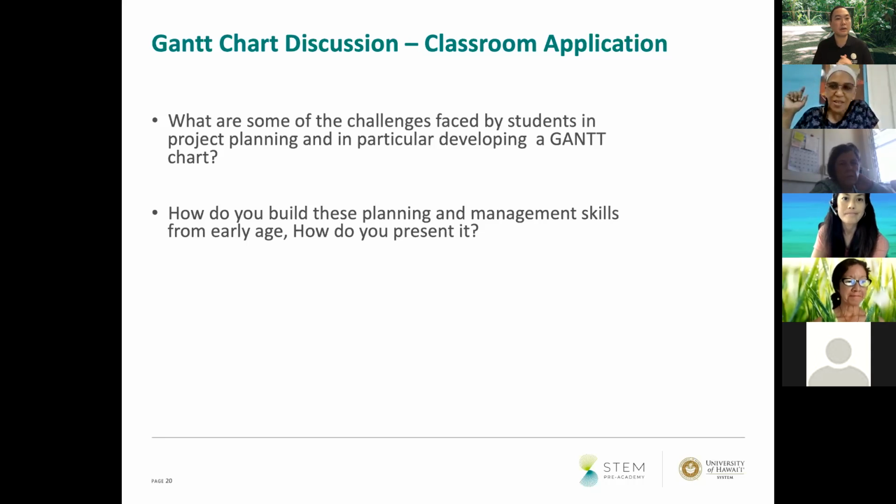Oh, can I say something? Yeah, absolutely, Audrey. Usually for my groups, I check their Gantt charts every day. So their team leader brings me the Gantt chart, and then they show it to me, and I check it, and they explain to me why they're not on target or what happened. And then I do that with them every day.